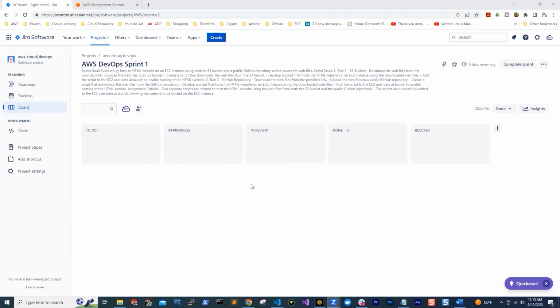So when you start working, the Jira board you will see is very identical to this, where you have your sprint, and for most teams a sprint is always 2 weeks. So that is for the particular task we are working on now: how long do you have to complete it? And in that sprint, for whatever task you are working on, you will have the opportunity to move them from one stage to another stage based on the progress you've made on that task. So it is pretty straightforward.